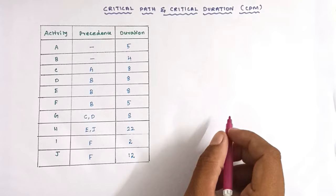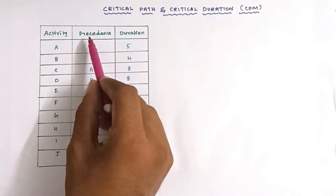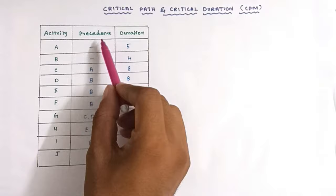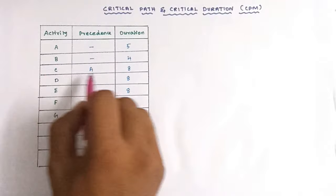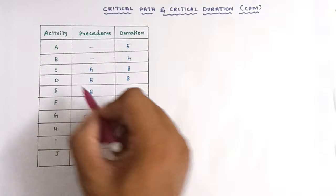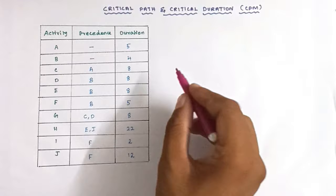Take this problem as an example. The activities and their precedence relationships are given along with durations. There are 10 activities: A, B, C, D, E, F, G, H, I, and J. For C, the precedent activity is A — meaning C starts when A is completed. After the completion of B, activity D will start. Likewise, every activity has a precedence relationship. First we have to draw the network path.